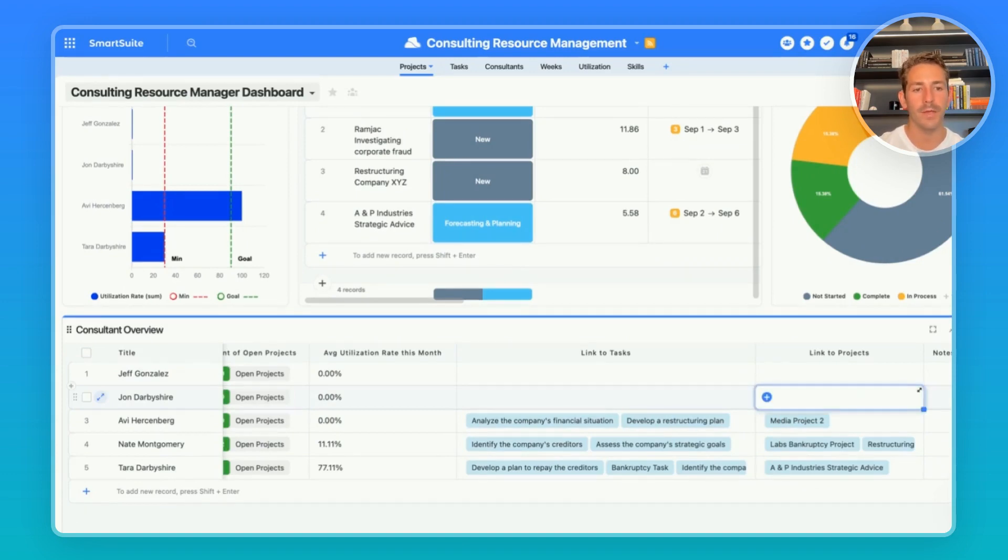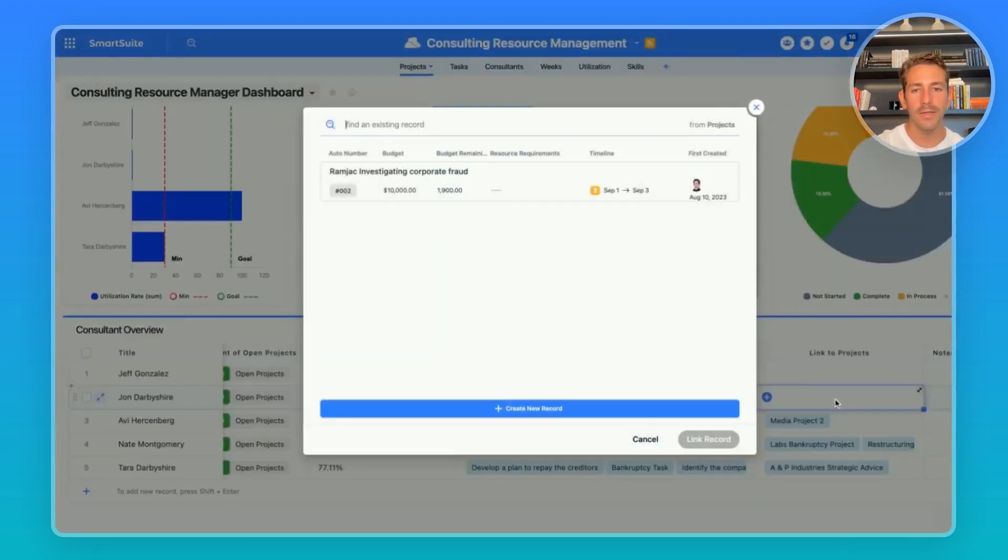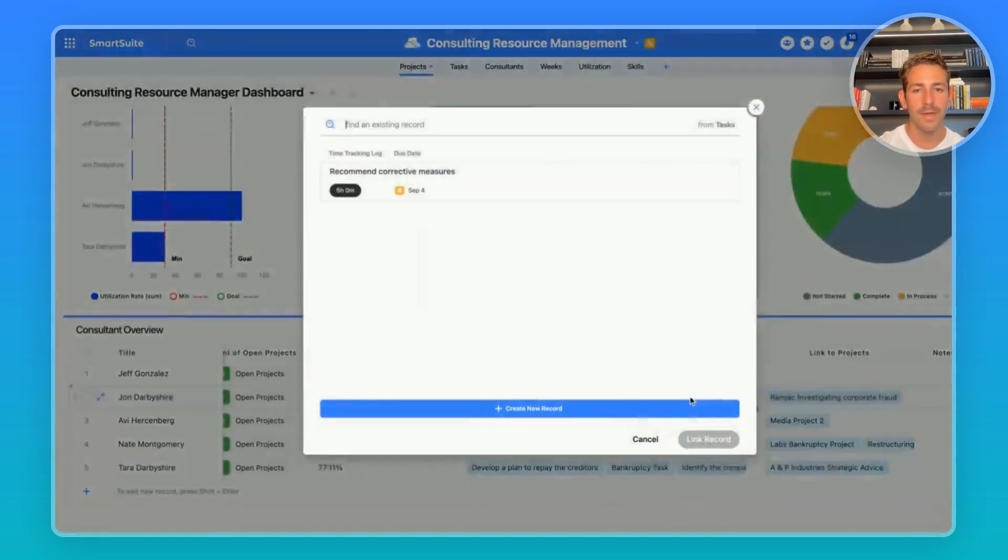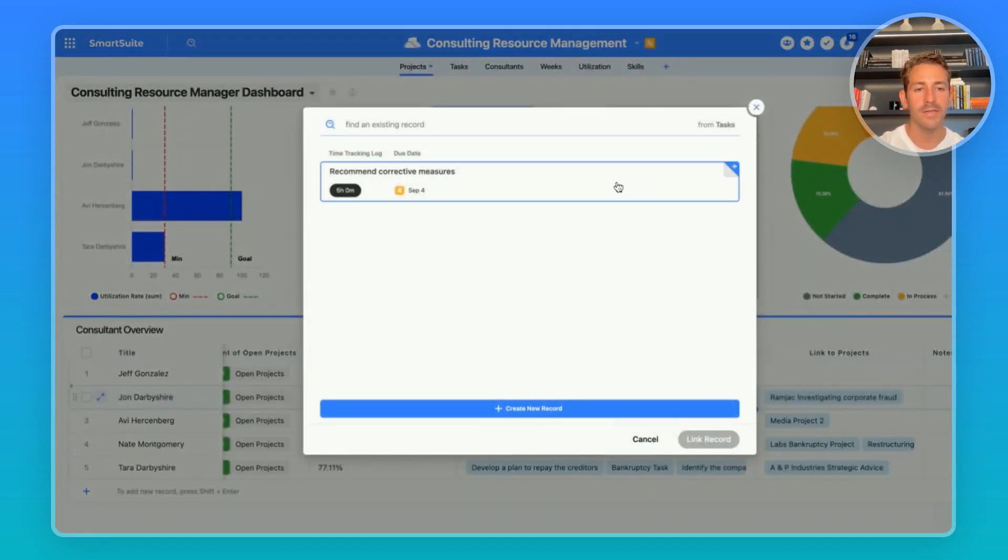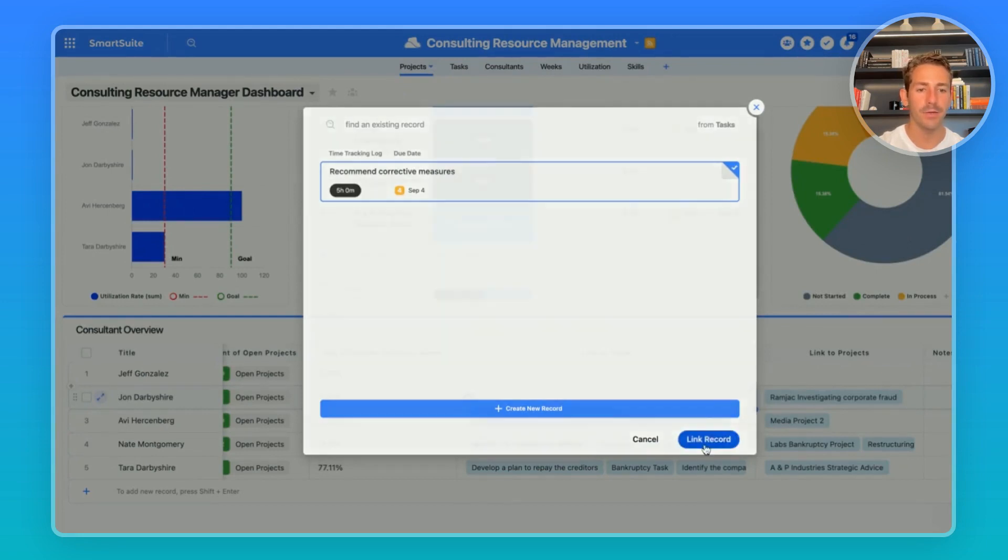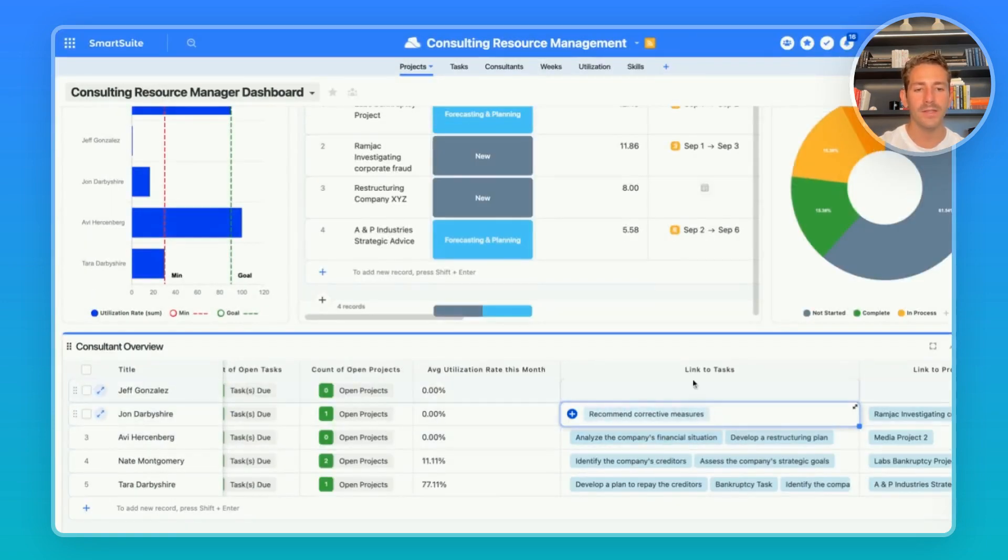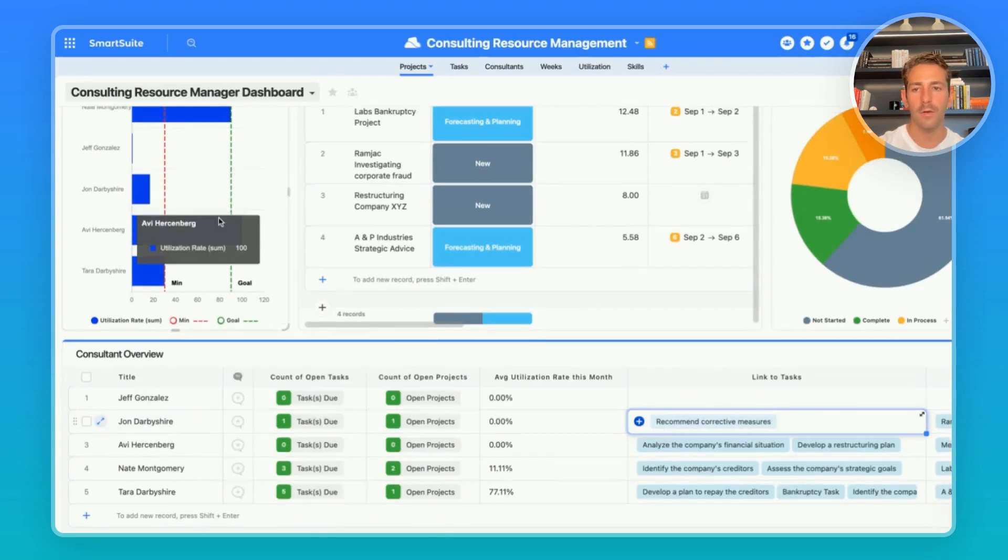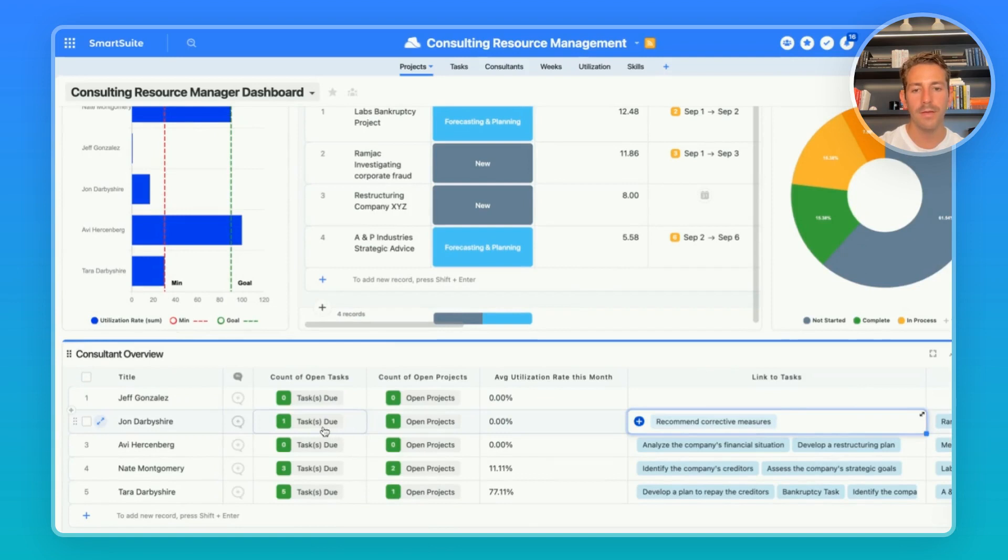We can also assign work from here, being able to look at the projects that haven't yet been assigned that fit the skill set of our consultants and then we're able to assign the tasks of those projects that they have been assigned to. When we link these tasks which has time information stored in it, we see that our utilization rate for that consultant goes up.